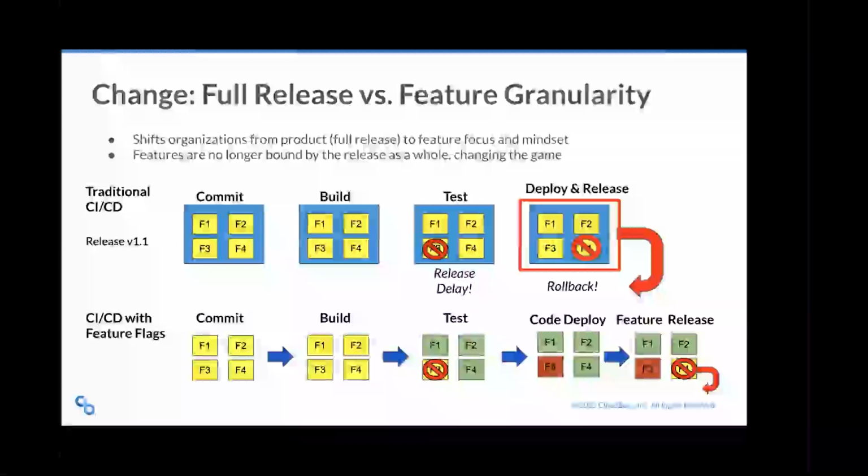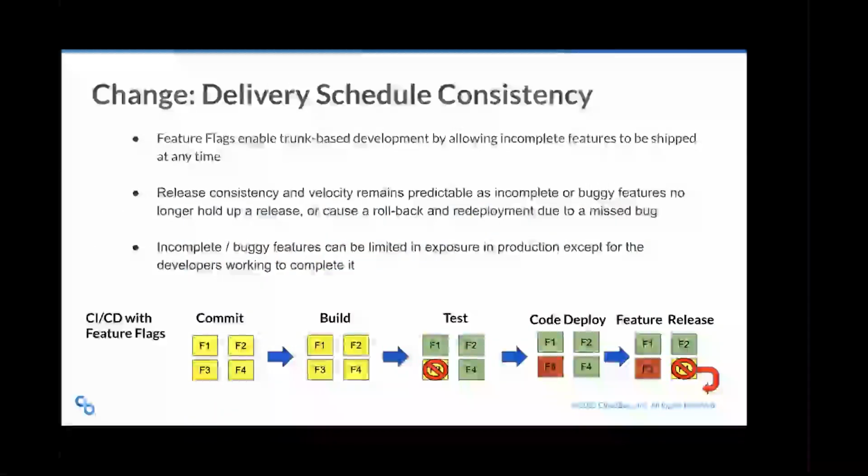And early on, the release team recognizes that feature 4 is not well accepted by users. So only a fraction of their user base saw this feature before they had to roll it back and improve it. And features 1 and 2 were able to stay live in production without a mass release rollback of everything at once. My colleague Doug will show an example of this process in action later on, but you can see the benefits of increased release velocity, risk reduction, and better feature releases based on live user interaction by using feature flags.